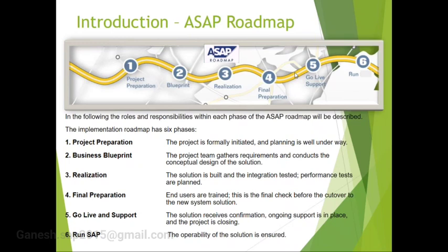Okay, the realization will have a splitting, and I will explain the different steps we are going to do. And then go live and support, which initially we call hypercare support. Once we have gone live, for the initial 1 month or 20 days, based on the business understanding and the agreement, we will have hypercare support. In hypercare support, we get more issues because the users are new, so they will make some manual errors, and sometimes they will cancel a document, or sometimes they create it wrongly. These kinds of support issues we mostly get in hypercare, along with any other program issues.